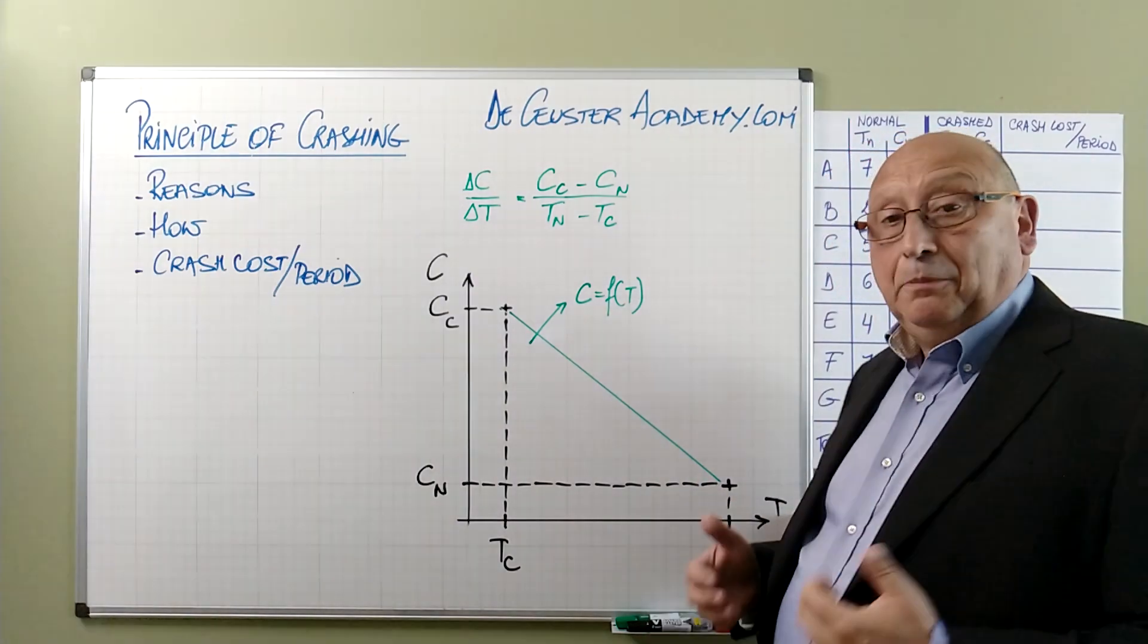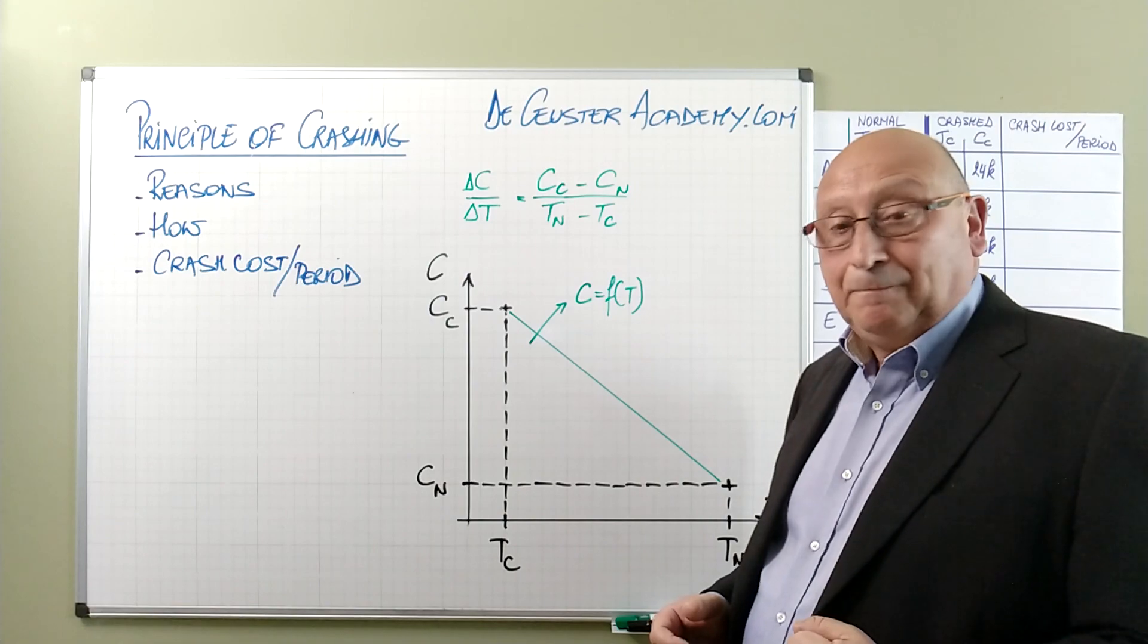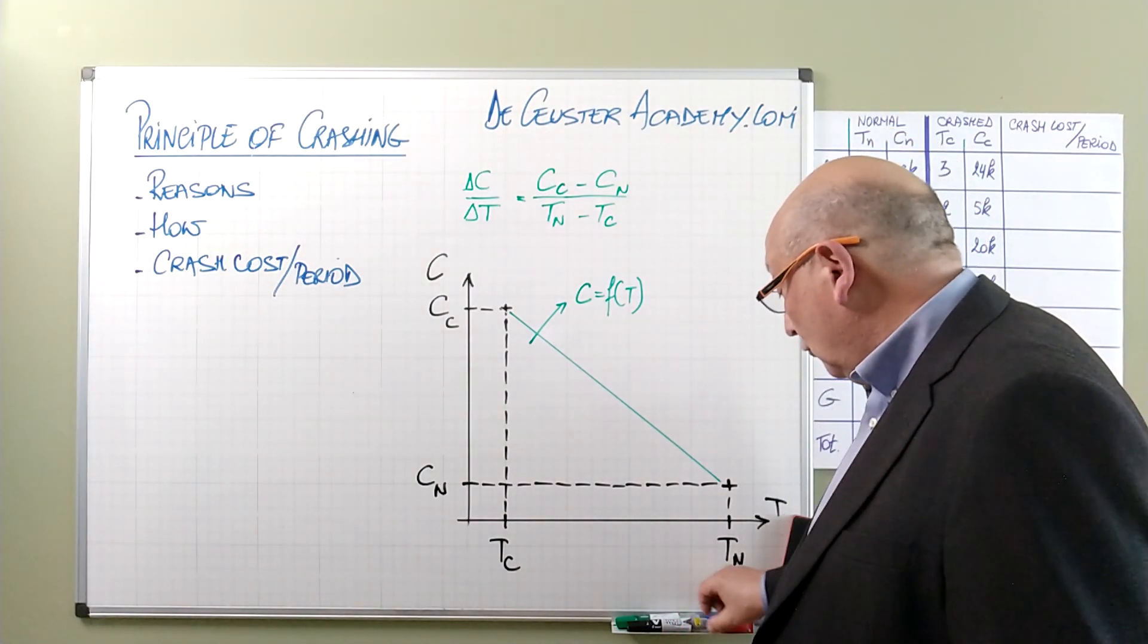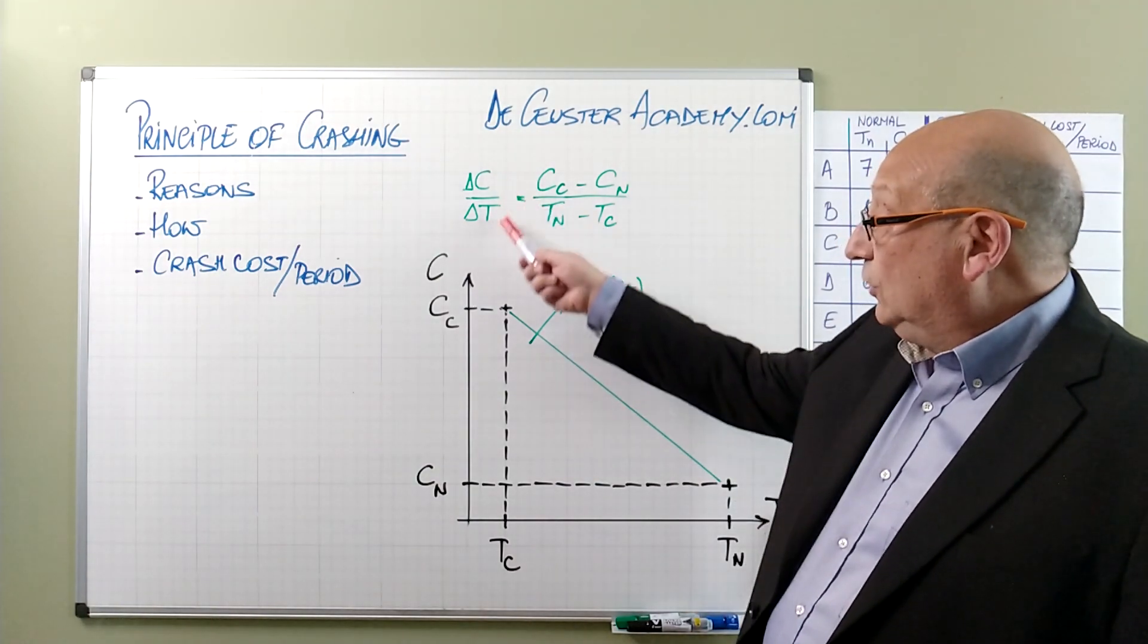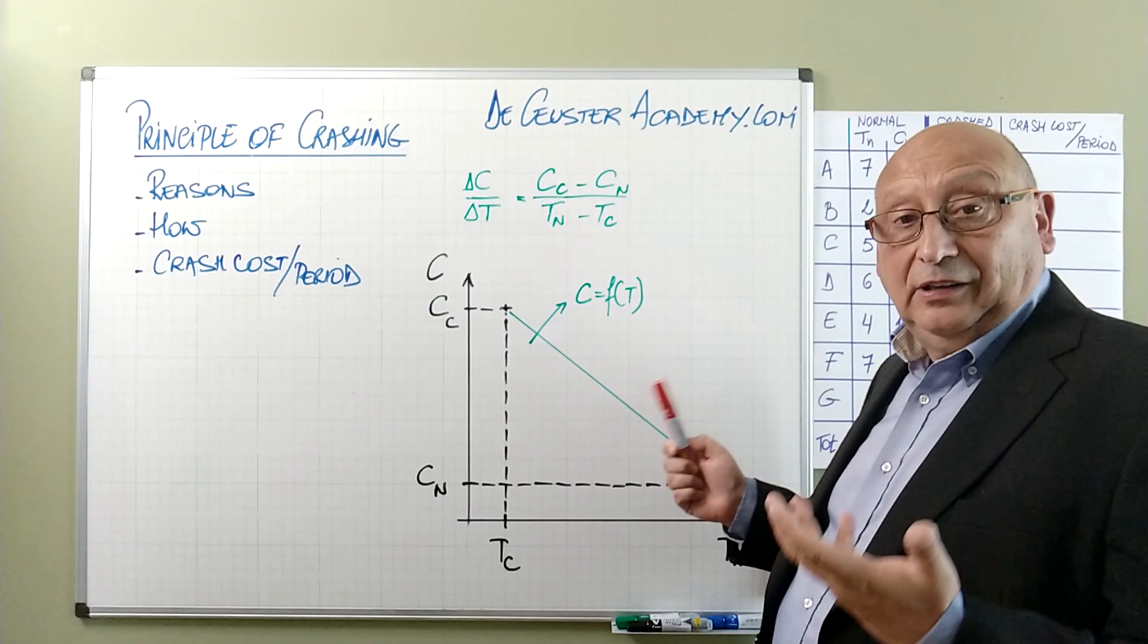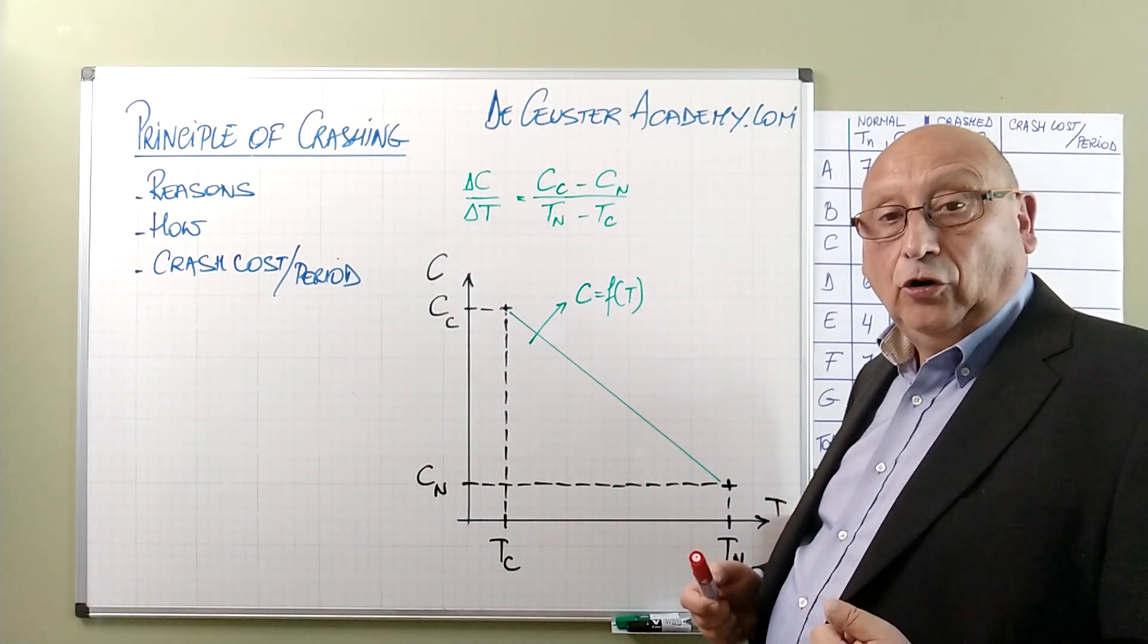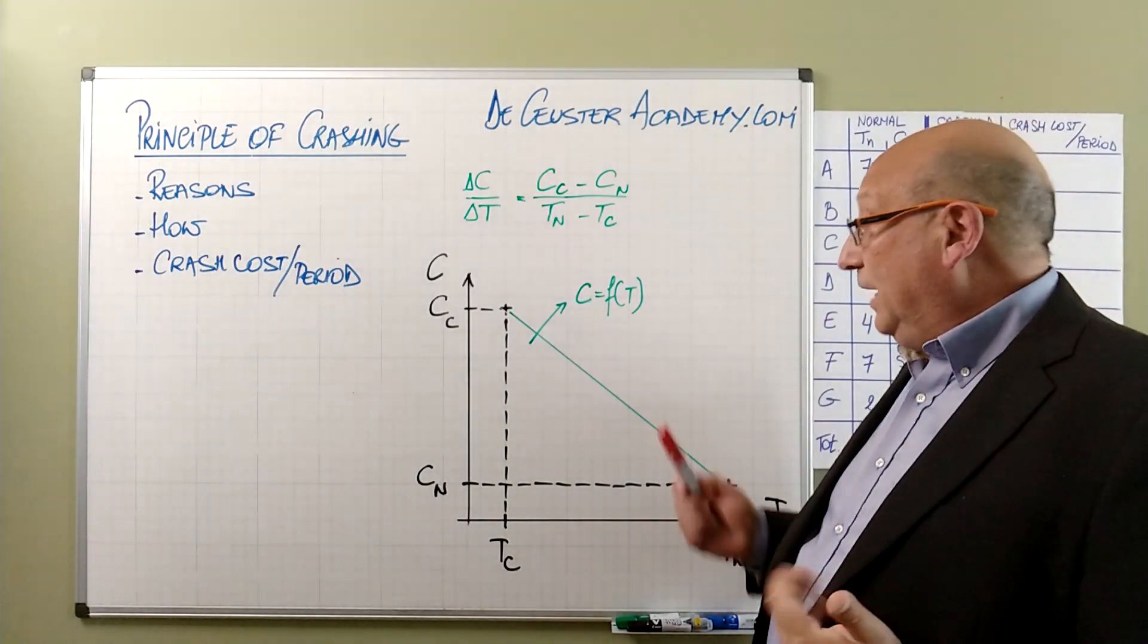The first thing to do is to say what is the crash cost per time unit: delta C over delta T. So we have the difference in costs, crash cost minus the normal cost, divided by the time. So this is the formula.